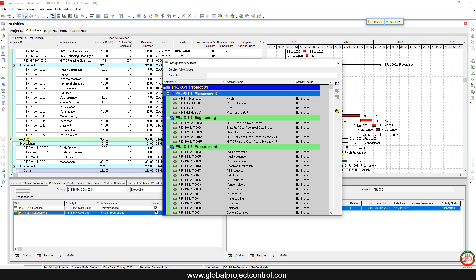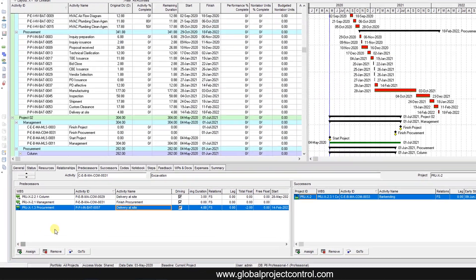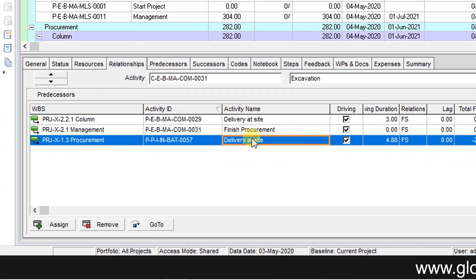I selected the excavation from Project Second and I want to connect it to the delivery at site for Project First. I selected it and assigned it — as you can see, it's going to be added to the list of predecessors. However, it is a derived activity and unfortunately P6 in this case is not providing good information.